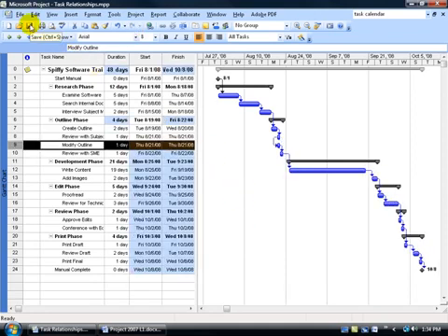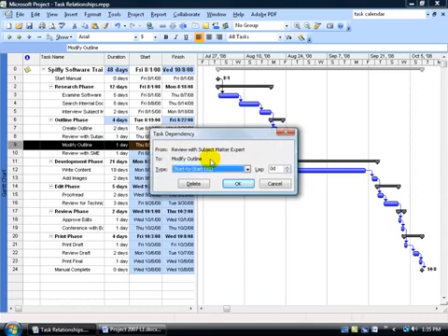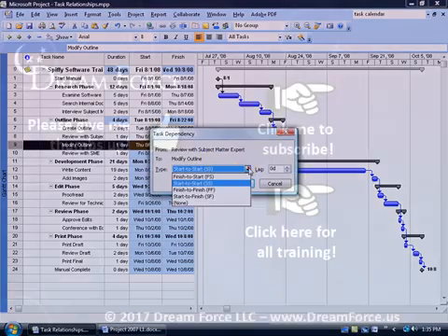So as long as you don't click on the save button, you can do your undos and redos to see how the project's moving along. And of course, you can always save a backup if you're not sure about your ability to undo, redo, and save at odd times. Also, one last thing is that you can edit your relationships on the thin line in the Gantt chart. See that little thin line start to start here because it's coming around this way? If you're good at it, you can hover over it and double click really fast. And there we go, you can modify it there as well.